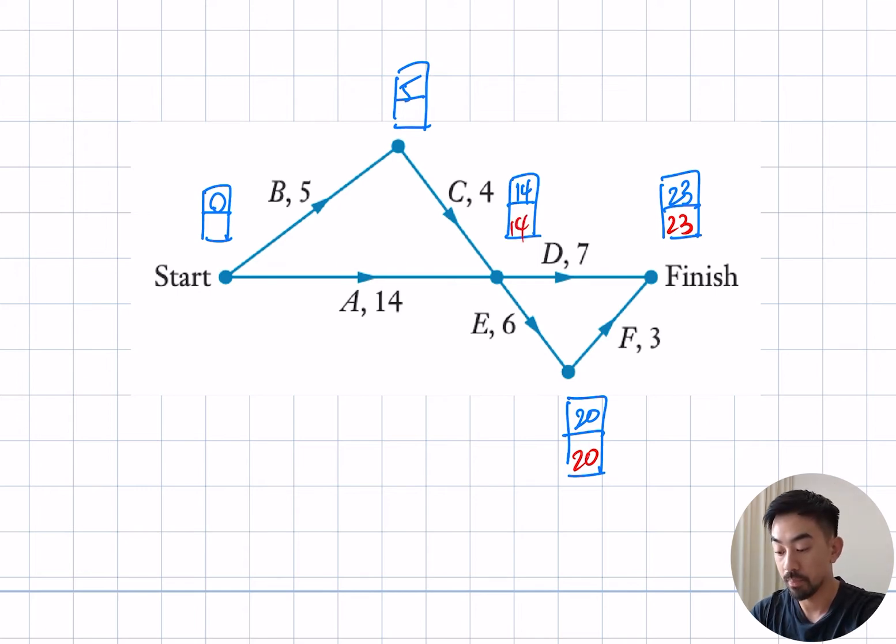Going up here, 14 minus 4 is 10. And then going back to the starting node, I've got 14 minus 4 or 10 minus 5. It has to be 14 minus 14 because that's 0. So to highlight my critical path, it looks like it's going to go from here to here, and then down and then up here. And that's my critical path.